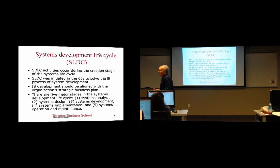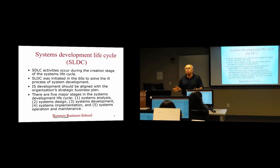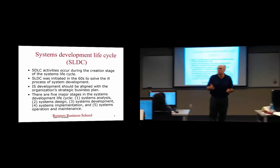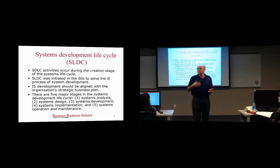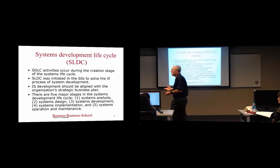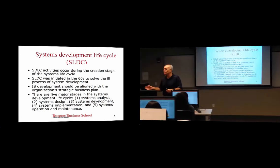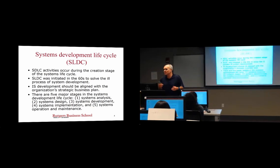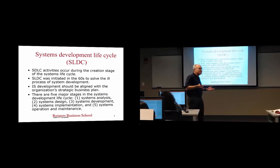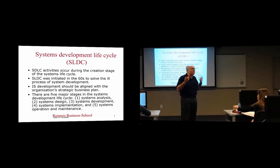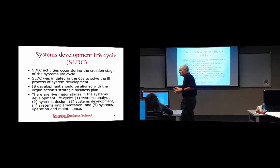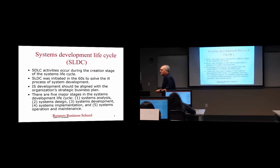Why do we see a problem with simply adding more programmers? Because programming happens in your head. It's not like digging — it's like solving a math problem. If you are trying to solve a math problem and running out of time, you add more people and say, 'Okay, why don't you all solve this math problem together?' Is it going to go any faster? Well, it depends on how difficult the problem is. In many cases, it may not, because they start talking to each other and waste time instead of concentrating. It's a different type of activity, and people started facing this in the mid-1960s.